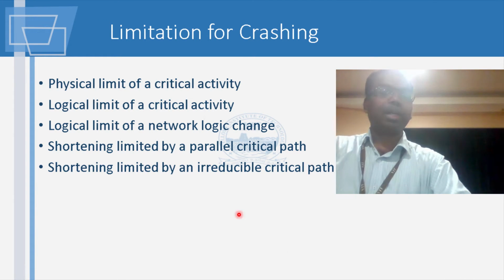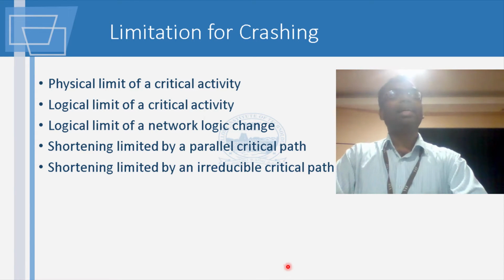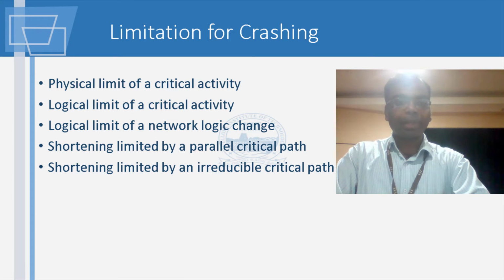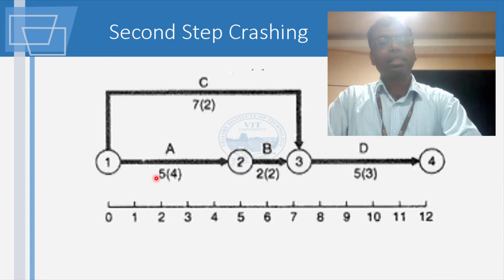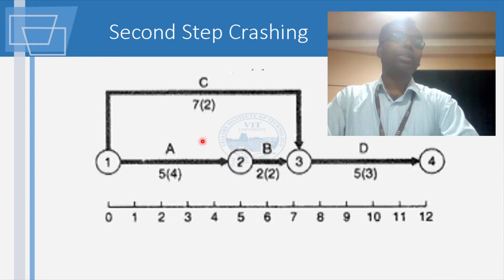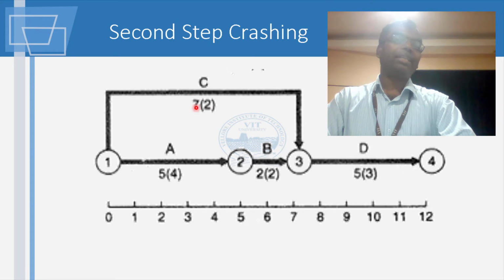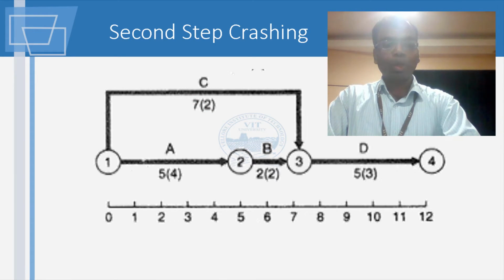You can have many parallel paths, but it would so happen that you cannot go slower than the previous path. For instance, we were showing this slide. So 7 days here, 5 plus 2, 7. If this were 8, there is no way by which you can reduce it to a number below 8.